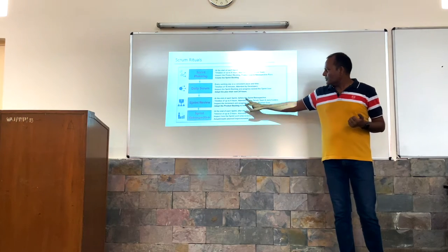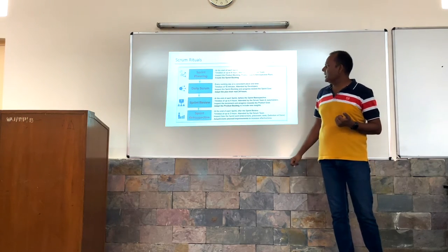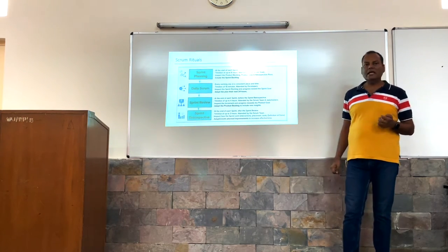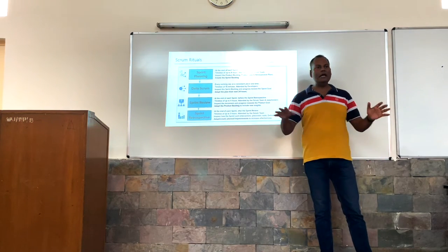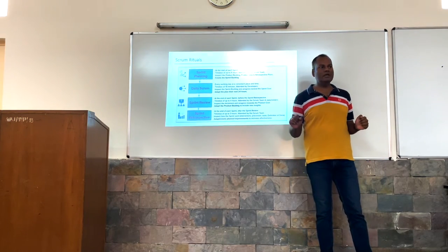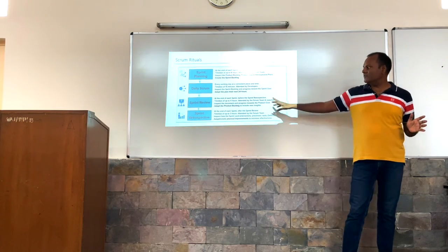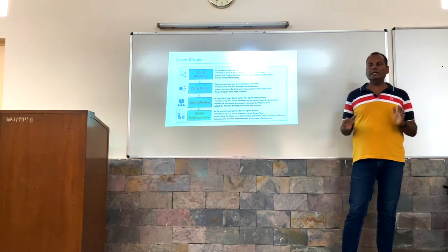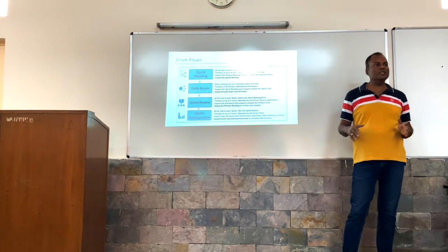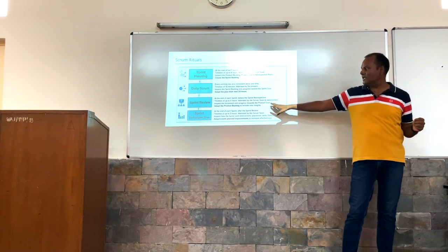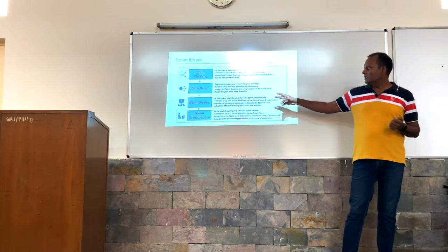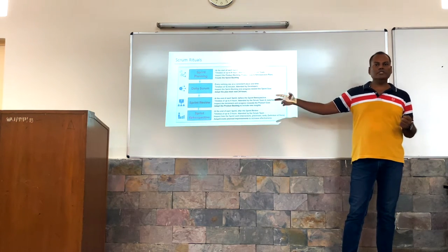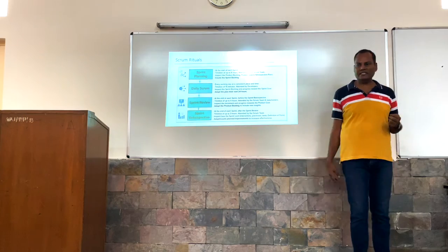Third meeting is the sprint review meeting. At the end of the sprint, when the entire team has finished their work, they sit with the customer or end user and provide a demonstration of the working software. The team has been working for the last 15 days, and they note down whatever feedback or input they have from the customer side, and they need to work on those inputs in the next sprint, when the next sprint starts.